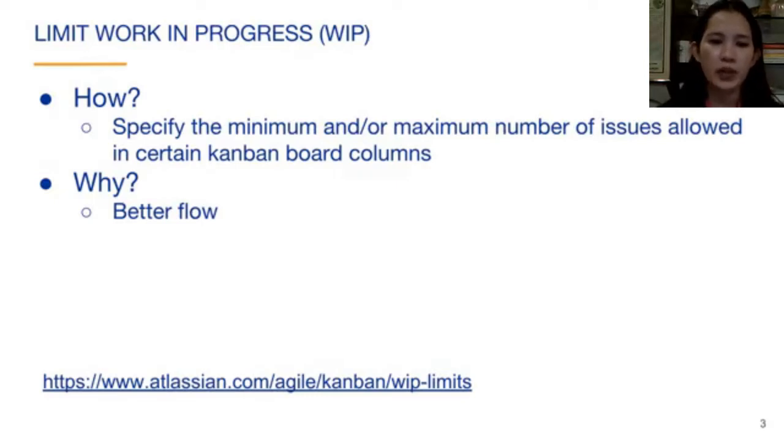By limiting work in progress, any bottlenecks in the process are quickly identified because there are relatively few issues in progress at any time and problems tend to be easily visible. Limiting work in progress also limits the amount of waste in the process. If there is an inventory buildup of issues in a status, there is waste because the work in the issues is delayed. Limiting work in progress also limits the amount of rework that may need to be done if there's a problem caused in an early process step, but identified in a later step. There are simply fewer issues to fix.